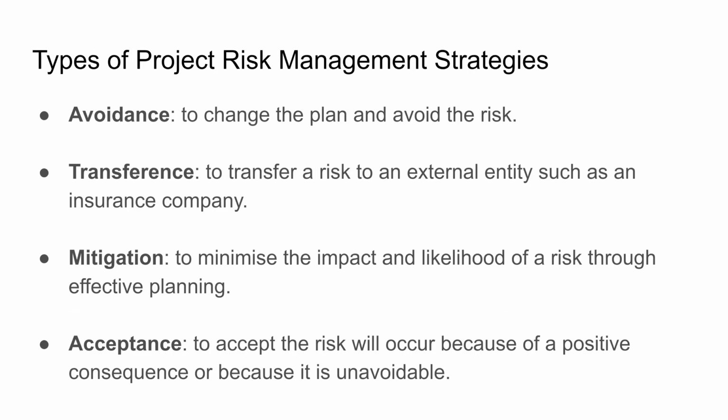Incorporating project risk management strategies into the planning stage of a project is critical. By having a risk management strategy and plan, it reduces the time and cost to respond to events and issues that arise after project work begins. Risks are identified by their likelihood and impact. These criteria are used to classify risks and determine appropriate strategies. The four main strategies are as follows.